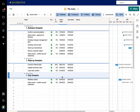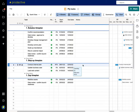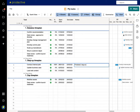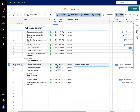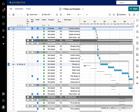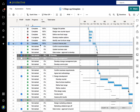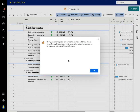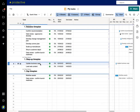From the dashboard I can click on it and go straight into the report, and within the report the power lies in being able to directly update the project plans. So if I look at Step Up, I've got 'Conduct Internal Pilot' — this was completing next week but actually it's Friday now and we've managed to finish it. So I'm now going to mark that as 100% complete and add a note: 'finished two days early.' If I save that and click through to the plan, you can see 'Conduct Internal Pilot' is now 100% complete with that comment. Going back, you can see that task has now disappeared off the list.